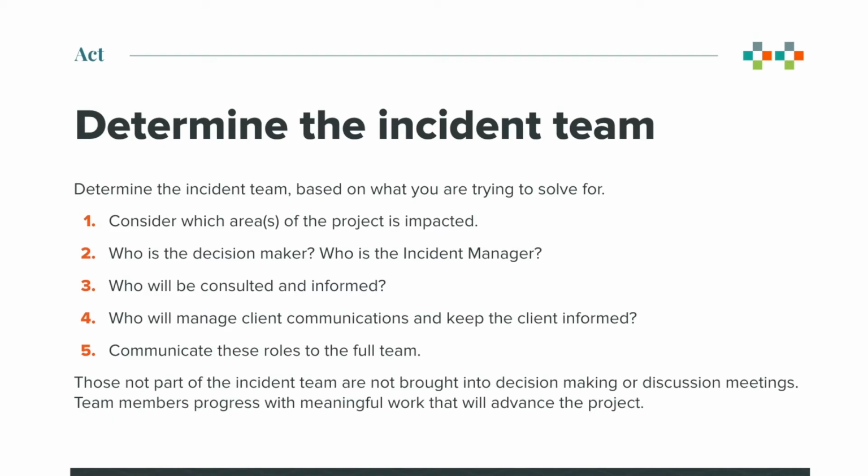And then finally, communicate these roles to the full team. This is imperative. Do not limit communication of the roles to your incident team. You want to share it out to the full project team and those involved. Those who are not part of the incident team are not brought into the decision-making process or into discussion meetings. This allows team members to progress with meaningful work that will advance the project in other ways.